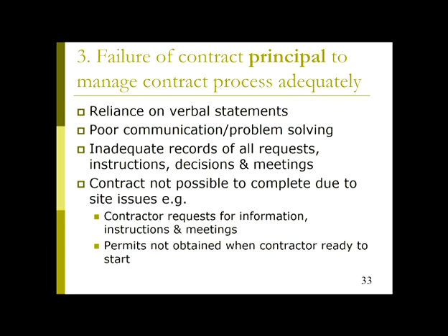Another area that we haven't really talked about is that the contract might not be possible to continue for what we call site issues. So it might be things like the people who are working on the job have asked you as the project principal for information or instructions, or we need to talk about something, and you need to be available to do that communication, provide that information as quickly as possible, because the project stops until you do.